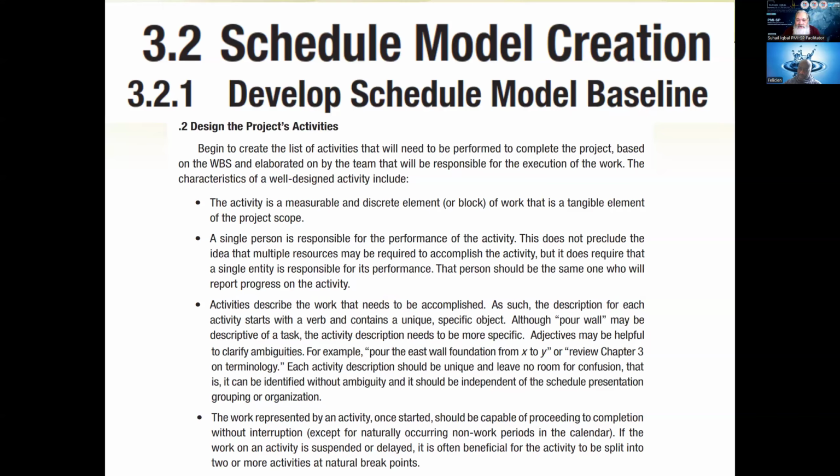So it should be a short statement, but at the same time, you can add something to it, like the deadline. For example, pour wall within 3 days, something like that. But the minimum format should be like this and not a complete sentence.